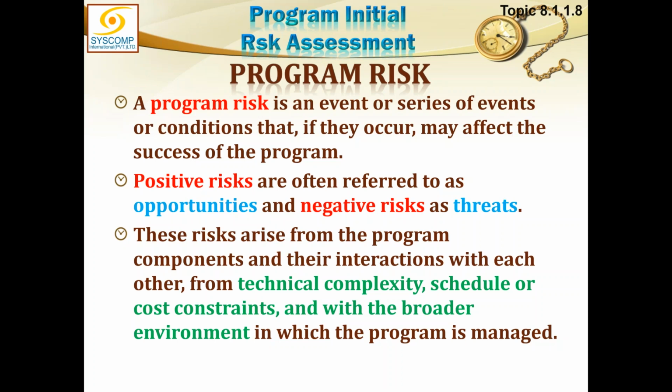If it affects other components of the program, I would think so. Exactly. If it's only within that project, I don't think so. Exactly. Such project risks which do not affect other components and the organizational strategy also. These are two things. One is interaction with other components, and the other is they affect the benefit delivery or strategic alignment.